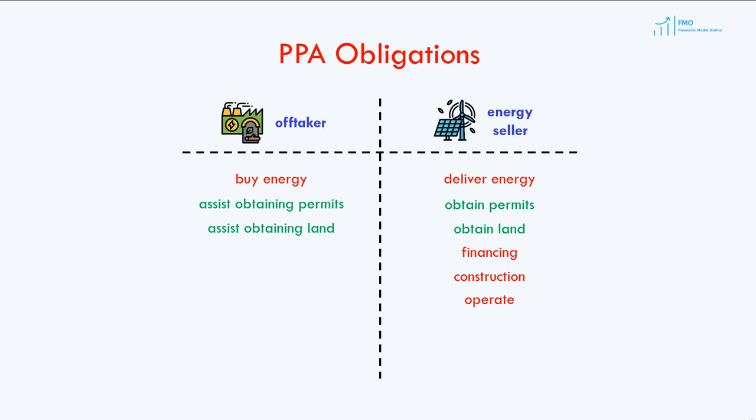Note that such events as getting all the necessary permits, reaching financial close, starting and ending construction, and beginning operations will be defined as project milestones in the PPA, and will have specific dates. Failing to achieve these milestones will, typically, result in the default of the PPA, with important negative consequences for the energy seller.